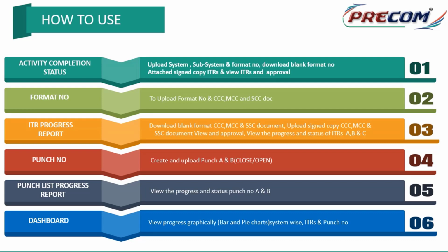Before I'm going for SCC, I can keep some of the punch points. A punch point has to be mandatorily closed. B punch point, I can hold it for a certain period of time. But before completion of the final completion, that is SCC, all the punch points have to be completed. So there are rules and validations.